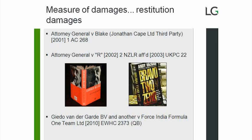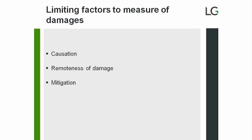Turning to the factors which might limit damages flowing from a breach — first, causation. The claimant must show a causal connection between the breach and the loss, and the court generally relies on common sense to guide its decisions. On remoteness of damages: without legal restraint a victim could point to all loss resulting from a breach however improbable or unpredictable, but common law states that a man is not to be held liable for the infinite consequences of his wrongful act.